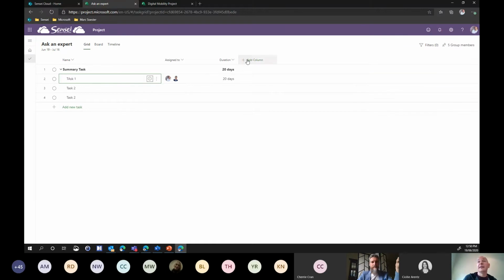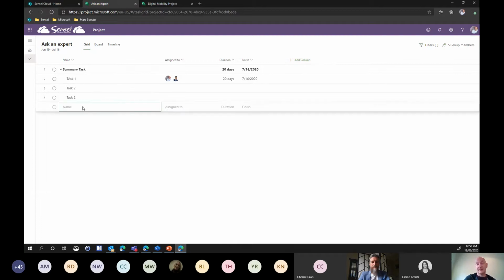And of course, you have then the ability to add a whole bunch of additional information, finish dates, start dates, all of those things. Now, in addition to that, we talked about different mechanisms on how you manage those tasks. So this is one way, just creating your list. And I'm just going to tool my milestones here. And I know milestones still have a 0 duration. And here I'm just going to say this is 2 days and this is 3 days, just so that we have a bit of data available.